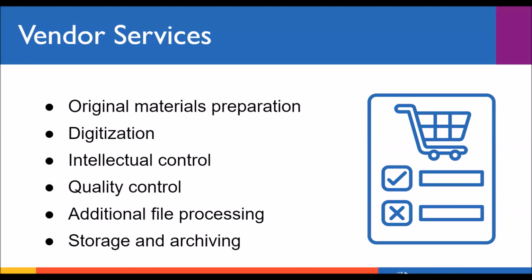That could be a new folder or new boxes or new reels. But digitization is a great time to rehouse your material if it needs it, because you're already going to be handling material one at a time. And so you're reducing the overall handling. If you can take something out, digitize it, put it in a new folder or a new box, it's going to be a lot cheaper than if you had to do it outside of this workflow.